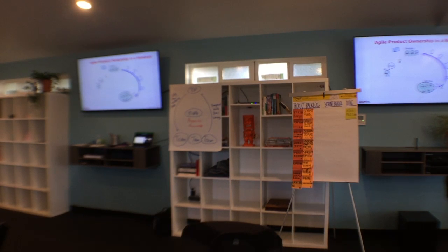Capacity is easy to measure. Just count the number of stories released per week. Some stories are big, so they count as 2. Some are small and count as a half. But all in all, it adds up to about 4 to 6 stories per week. Some people call these story points, but I'm just going to call it stories per week.